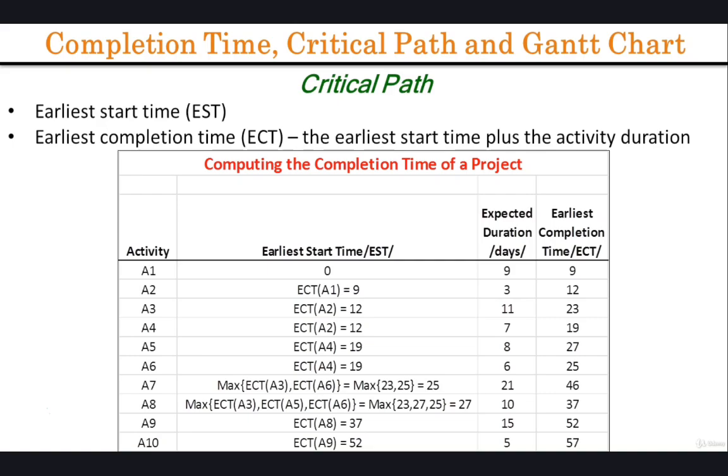Second step, identify all activities that can be initiated at this point, that have all information providing activities complete. For a given such activity AI, I compute the earliest start time as the maximum of the earliest completion times of AG, where AG are all activities providing input to AI.